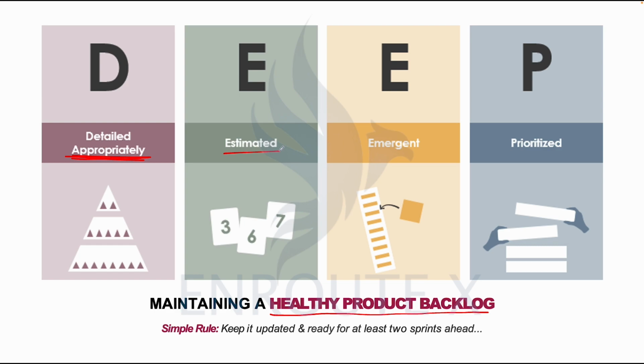However, when this team sits on the backlog at the sprint planning meeting, the team now goes into some form of voting where each person could express themselves on how long they feel each task should take.